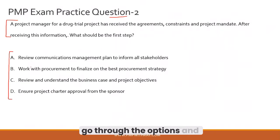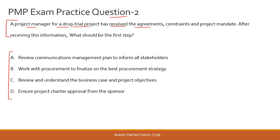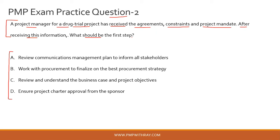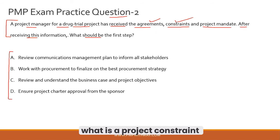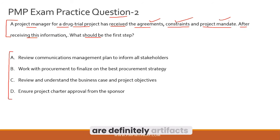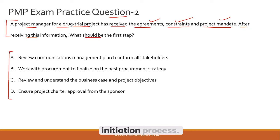Please read the question and try to answer it before we solve it together. A project manager for a drug trial project has received the agreements, constraints, and the project mandate. After receiving this information, what should be the first step? You should understand that these items — agreements, constraints, and project mandate — are artifacts generated during the initiation or pre-initiation stage, and generally feed into the project chartering process to produce the project charter.